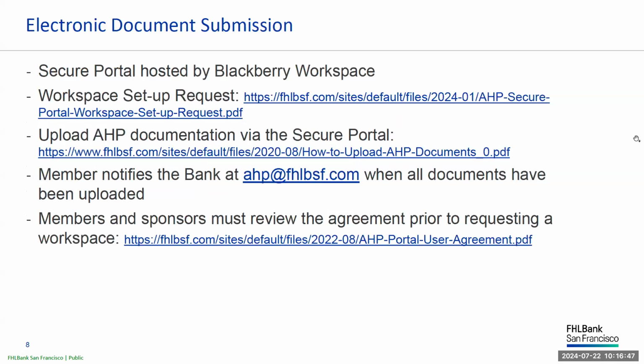Thanks, Cindy. As mentioned earlier, the bank will only accept disbursement request documents electronically through a secure online portal hosted by BlackBerry Workspace. Due to information security concerns, documents submitted via Dropbox or other file sharing links will not be accepted. Prior to accessing the secure portal, an executed workspace setup request form must be provided by the member and sponsor for each project. This workspace used for disbursement and initial monitoring is in addition to the workspace setup at application.